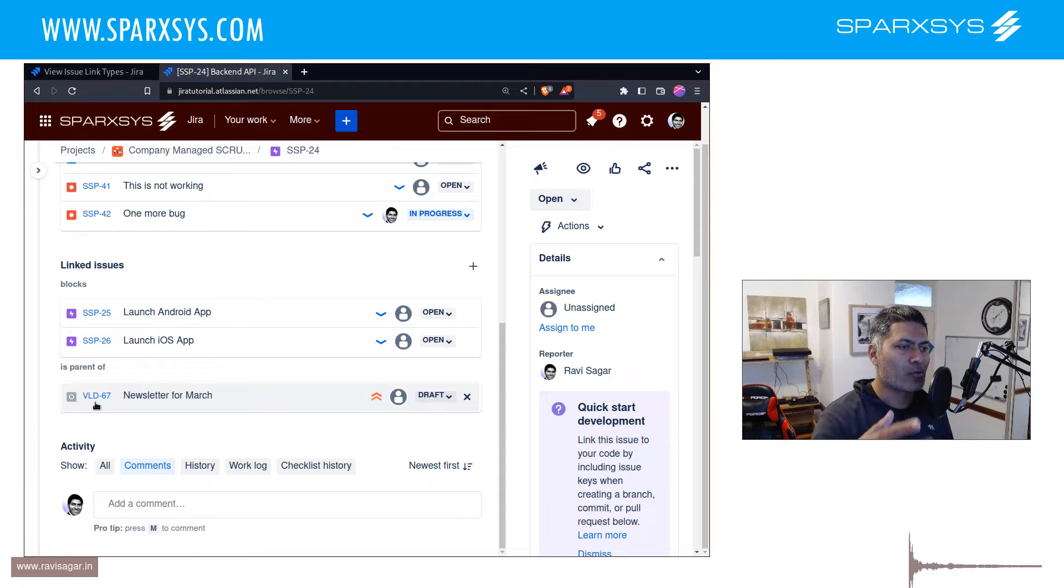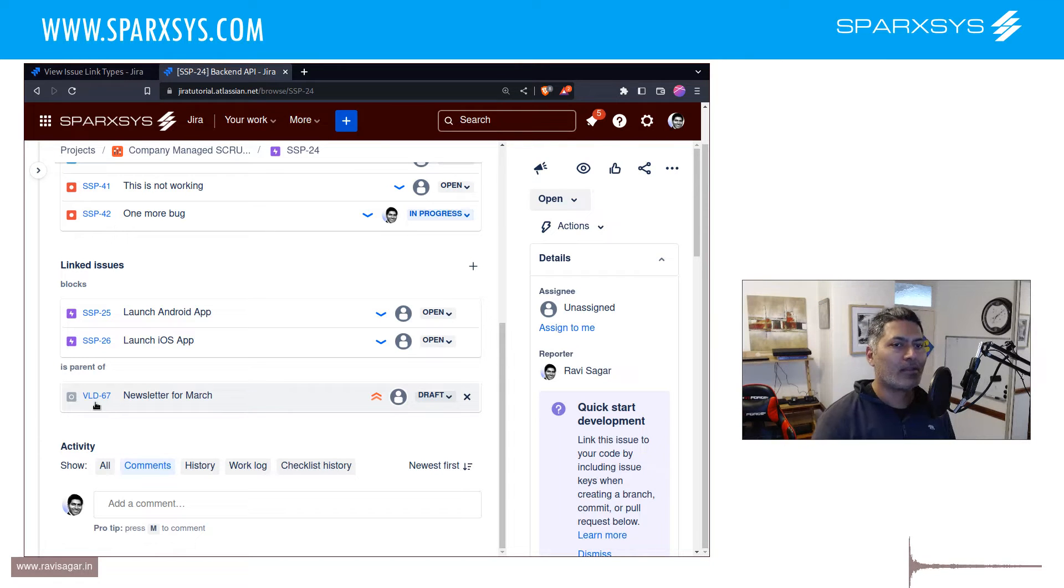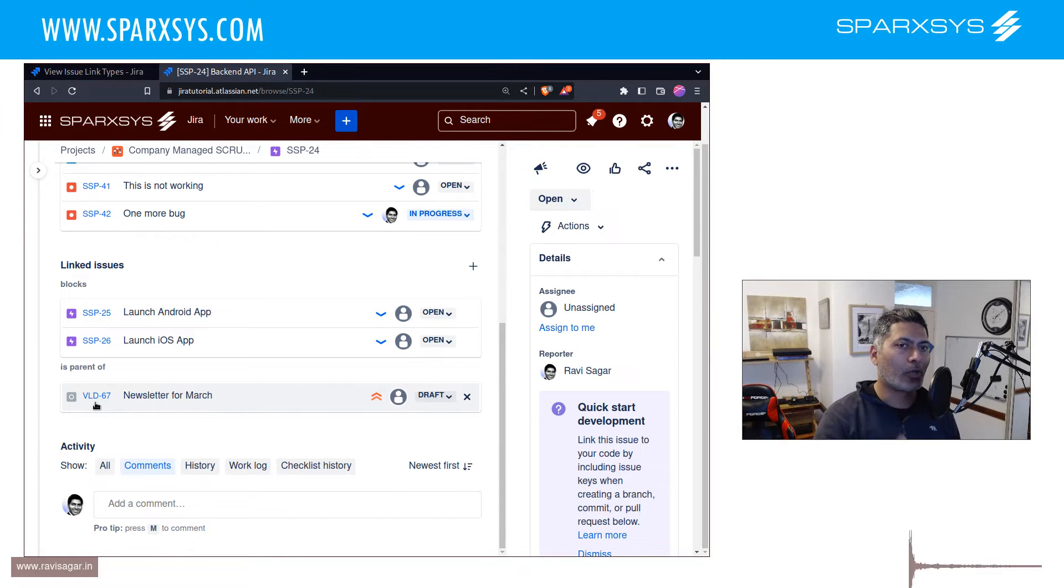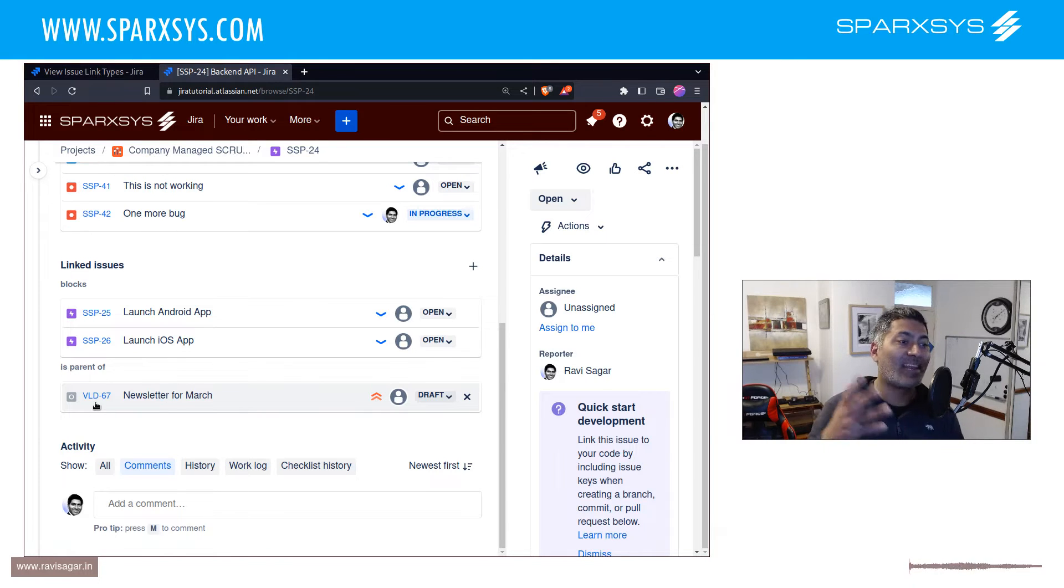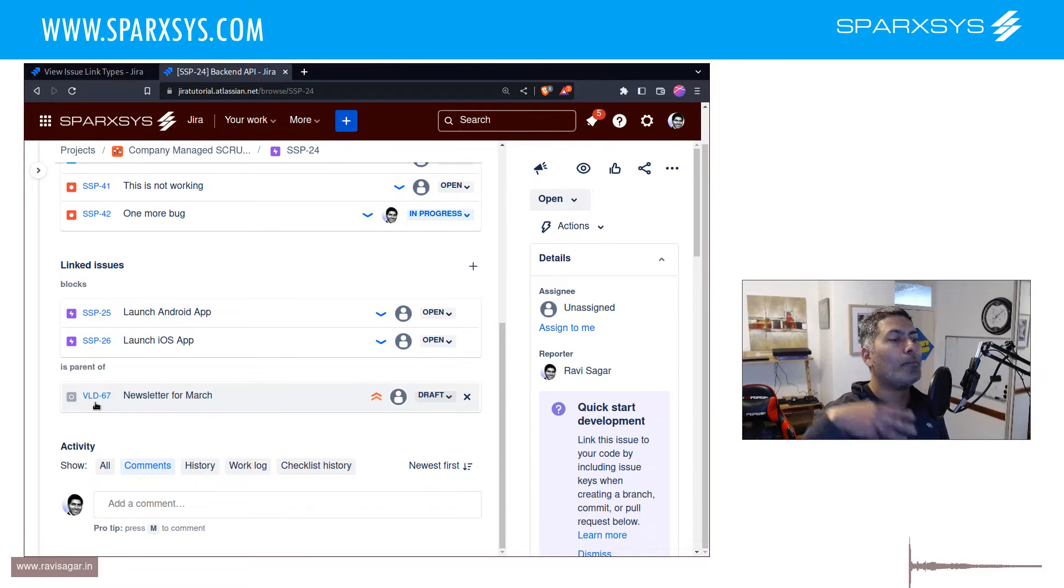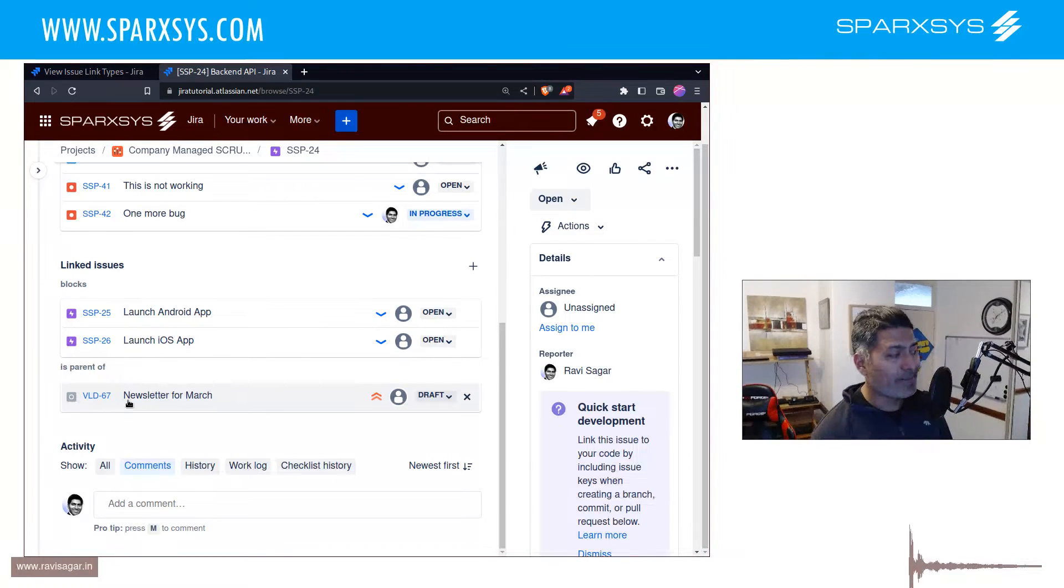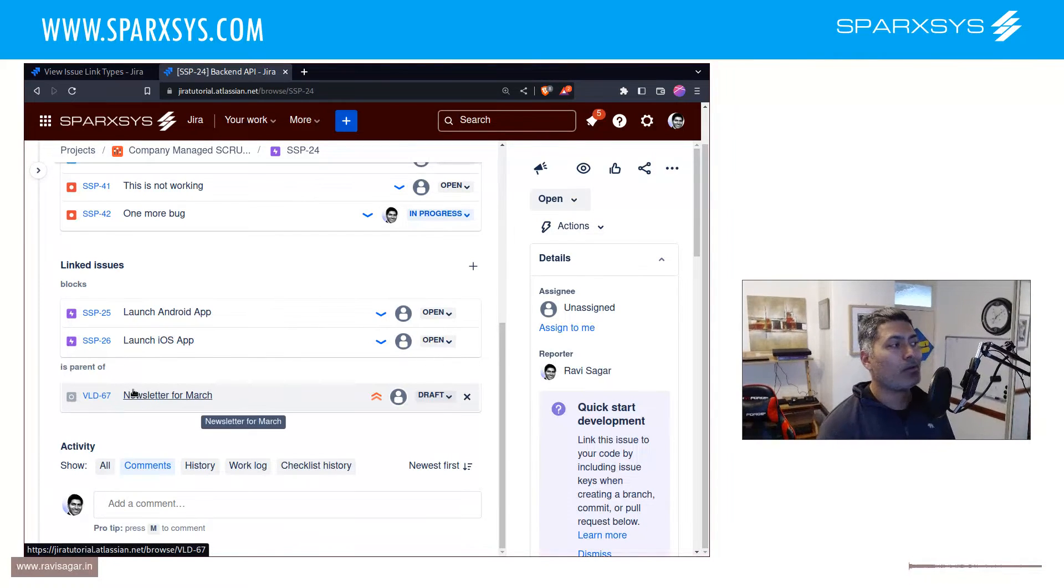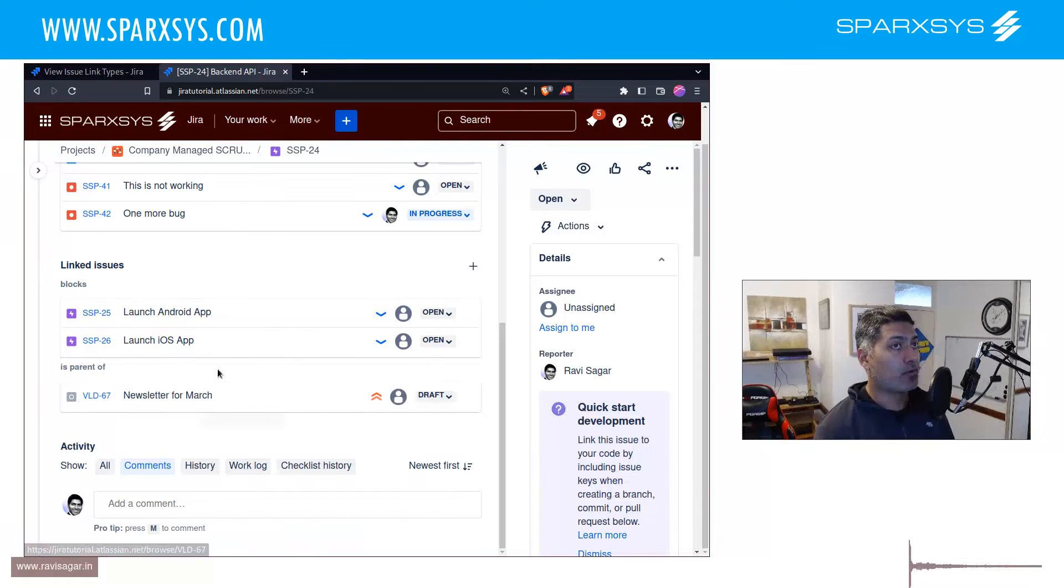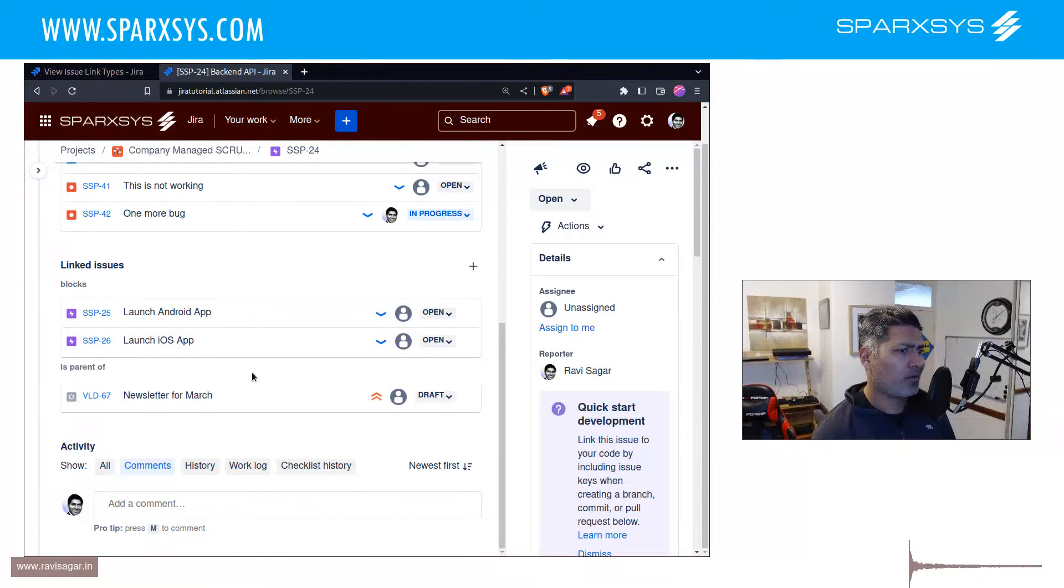And I immediately stop them that this is not the right way of doing it. If you want your stories to be part of an epic, you have to use, of course if you're using advanced roadmap with multiple levels on top of epic then of course you have to use the parent link field. But if you're talking about epic and stories then you have to use the epic link field. So epic link field or parent link field is something that you need to use when it comes to building this structure or hierarchy.